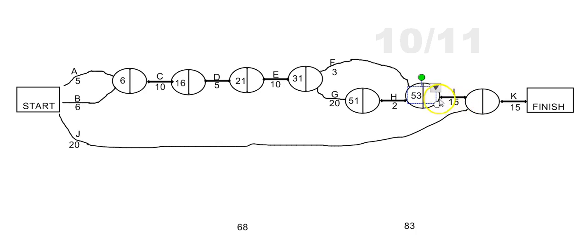53 plus 15 is 68. We've got to compare that to 20. 68 wins hands down if we're looking for the largest. And then 68 plus 15, if I calculate it correctly, is 83. So the time it should take for us to put that flat pack barbecue together, prepare the food and cook the food, should be 83 minutes. Let's hope we're not too hungry.